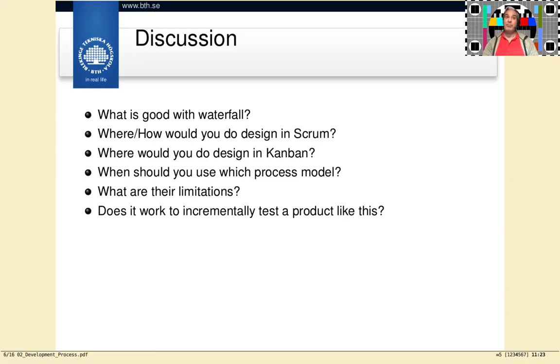Testing would be part of every user story, and then doing this big pre-release testing would be a user story in its own right. And that would mean also that you would need to sell that to the customer so that you have a customer value. And you need to convince yourself that there is a customer value in doing more testing. But the good part is that once it's in the backlog, it will hopefully get done, or you have a good reason for not prioritizing it.